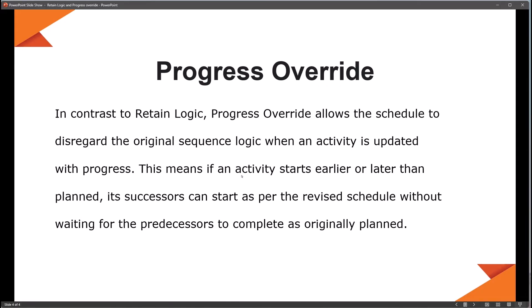On the other hand, progress override — just like the name implies — you're overriding the initial planned progress. It allows the schedule to disregard the original sequence when an activity is updated with progress. This means if an activity starts earlier or later than planned, its successors can start as part of the revised schedule without waiting for the predecessor to complete as originally planned.